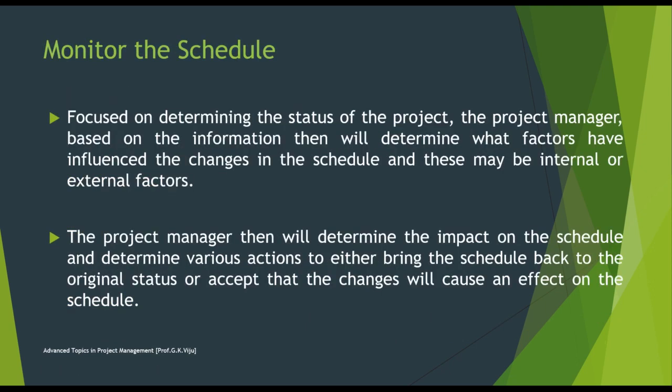Monitor the schedule. This is focused on determining the status of the project. Based on the information, the project manager will then determine what factors have influenced the changes in the schedule, and they may be internal or external factors. It is the responsibility of the project manager to check the impact on the schedule and determine various actions to bring the schedule back to the original.